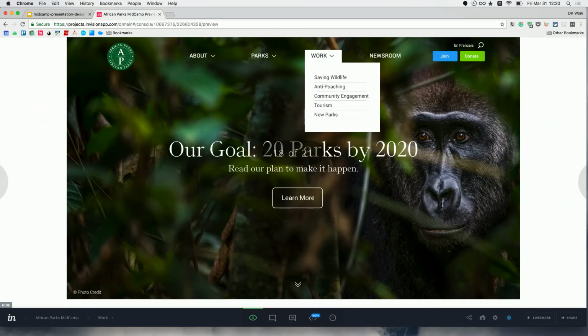And that's basically the process. That's what we show the client. After we get that approval, we're then in the process of building the site. What we're trying to do is get the design process efficiently done quickly so we can start building, and then do more work after we have the prototype, something they can react to, instead of spending six months doing 50 million page comps that the client's reacting to. We're trying to quickly show them the tools they're using to build the pages instead of the pages themselves.